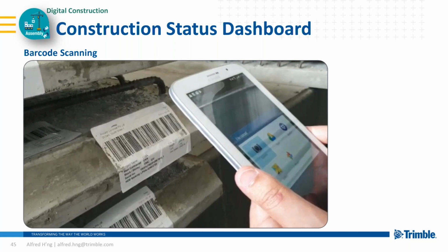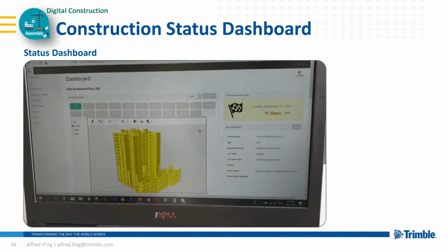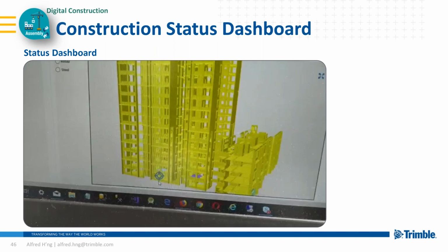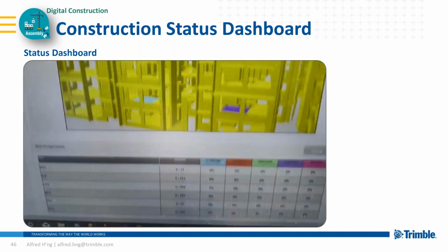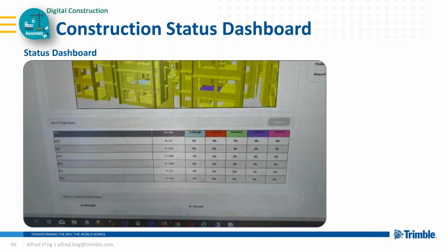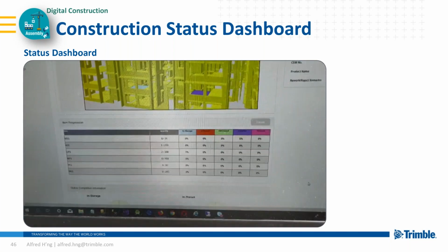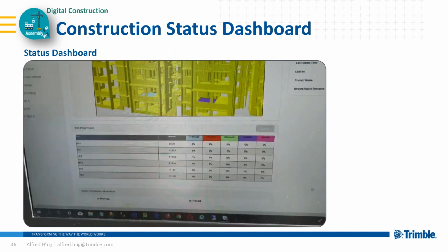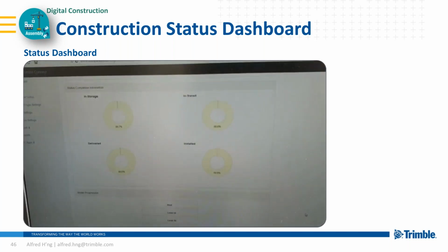Yes, so as a result, the status dashboard is updated immediately. As you can see, this was the second element that we scanned during the project. You can see that the panels have changed colors, and there's a small report to reflect the percentage of the progress and a bit of a graphical chart to show.